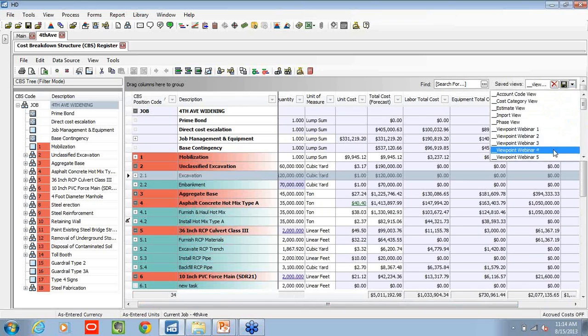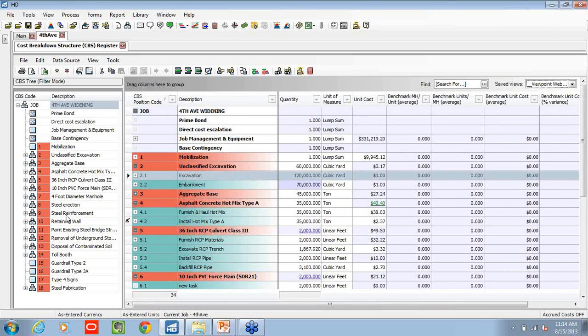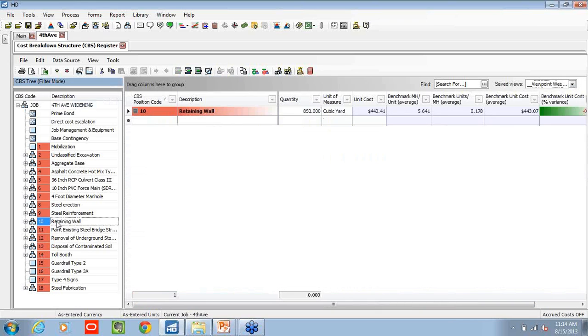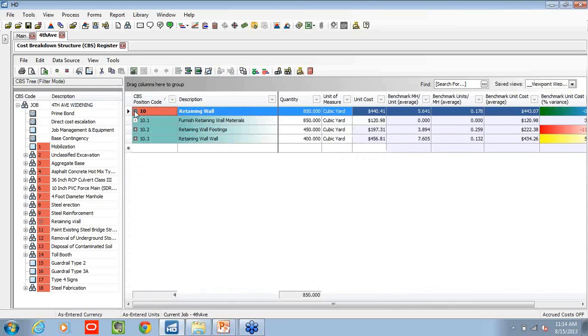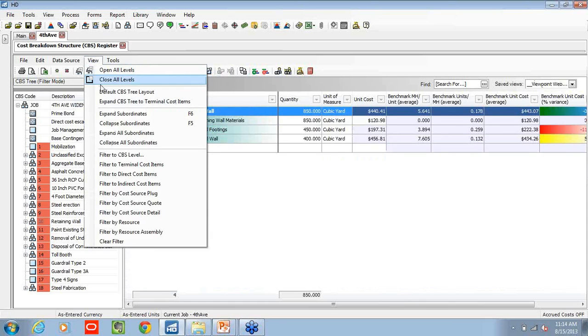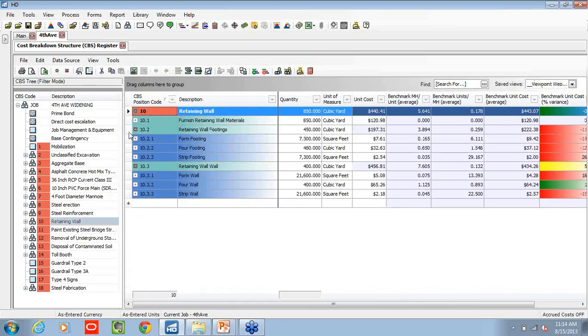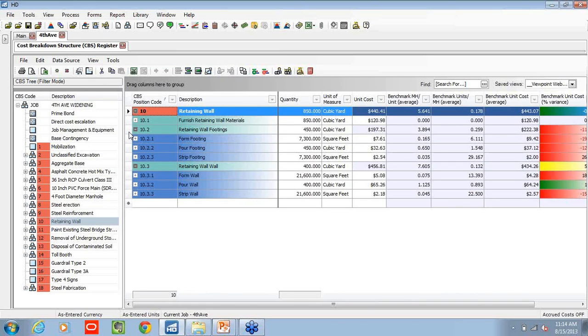And after we go through all our cost categories and vet this out, we can then transition to another view. Maybe we want to focus in on our retaining wall. And by leveraging our dollar's benchmarking capabilities, we can actually compare this estimate against historical jobs.